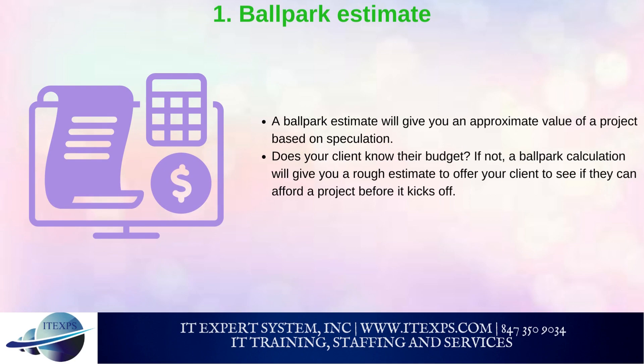Method 1: Ballpark Estimate. A ballpark estimate will give you an approximate value of a project based on speculation. If your client doesn't know their budget, a ballpark calculation will give you a rough estimate to offer your client to see if they can afford a project before it kicks off. Usually, this calculation is a combination of similar projects you have done in the past as well as any expenses unique to the particular project. For example, if your client needs a website built and your team has done similar projects in the past for $10,000, using the ballpark estimate, the cost might range from minus 25% to plus 50%. Although it's not the most detailed way to estimate the cost of a project.